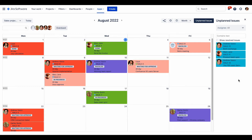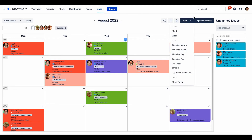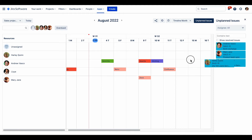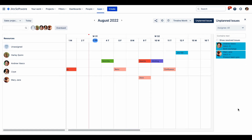Sometimes it is more convenient for planning to utilize timeline views. There are several options available: month, week, day, and year views. In the timeline month view, on the left section we can see our team members as assignees. On the main grid we can replan issues, assign from the unassigned line, or plan issues by dragging and dropping them from the Unplanned Issues area.